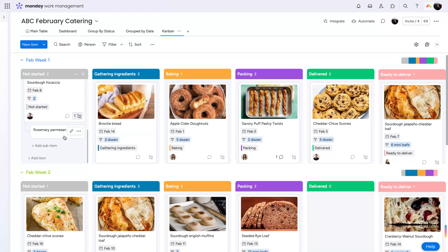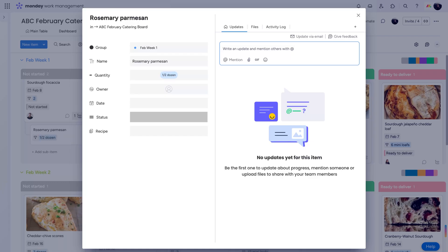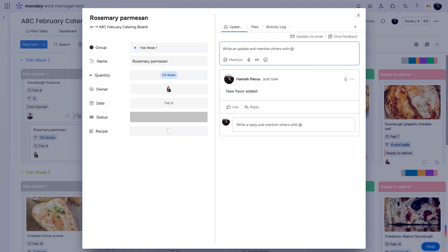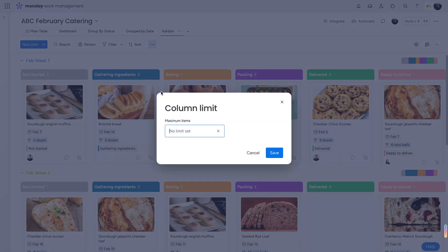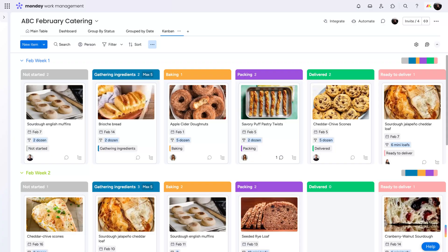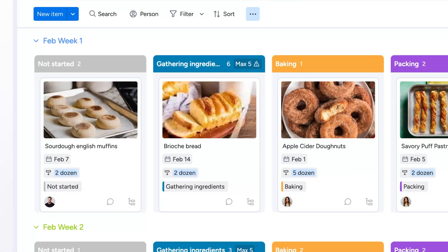Add sub-items from the Kanban view and customize them in the sub-item pop-up window. Add column limits to keep your board from getting too messy. If the number of items exceeds the column limit, you'll see this alert icon.